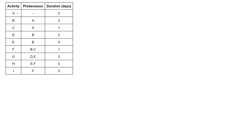To get started, let's look at the first activity with no predecessor — that's going to be A. We'll find all activities like this; in this case it's only one, and we start with that on the left. Moving to the next one, activity B depends on A and activity C also depends on A. So both B and C depend on A, meaning we need an arrow coming out of A going to each of them.